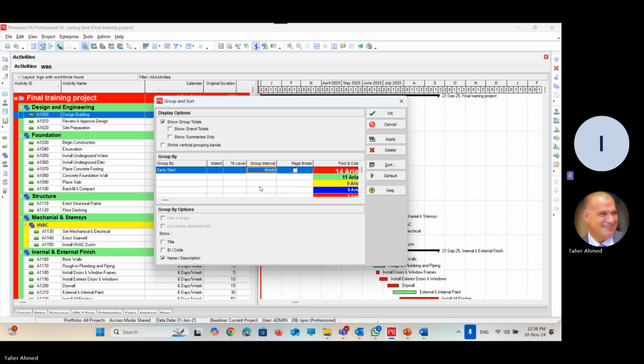Once we use months, Primavera deactivates both hide if empty and sort bands by alphabetical order. Why? Even if there are months with no activity, I have to keep them. I will not say January, February, April. No, I will keep March and March will be empty. So hiding the information if it is empty by time is not applicable.